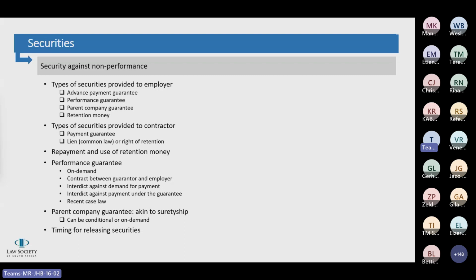A contractor's breach. In order to avoid these types of arguments holding water before a court in interdict proceedings, beneficiaries are cautioned against making a demand for payment under the guarantee unless and until it has complied with contractual requirements for doing so. So even though the contractual requirements are not relevant for payment under an on-demand guarantee, the beneficiary should not make a demand in circumstances where it knows that it has no contractual right to do so, as this could promote a contractor's argument for fraud.